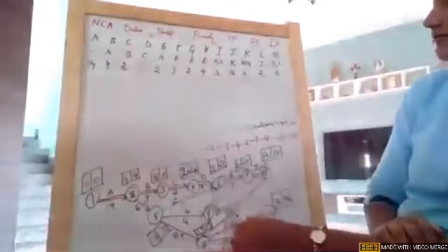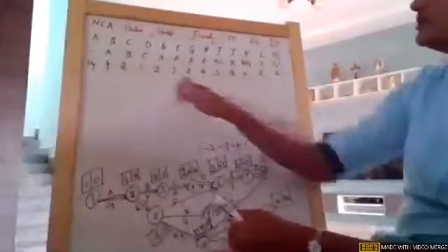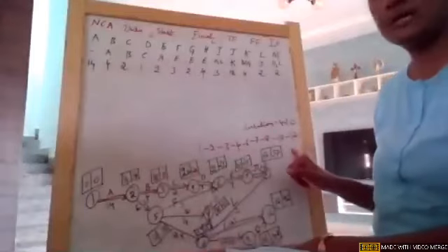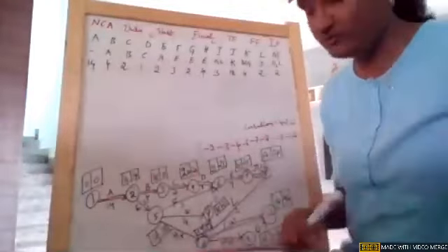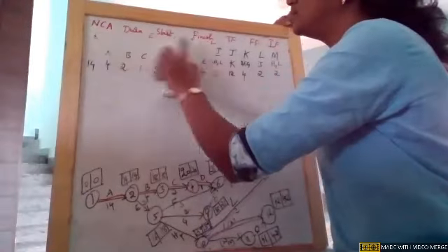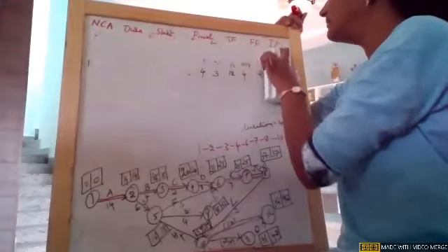Fine. So now we got the critical path, we got the duration as 42 weeks. Now these durations, earlier it was in days, now it is in weeks, girls. So the complete project can be completed if we follow this particular critical path within 42 weeks. Now we will see what happens to the total float, free float and independent float for non-critical activities.